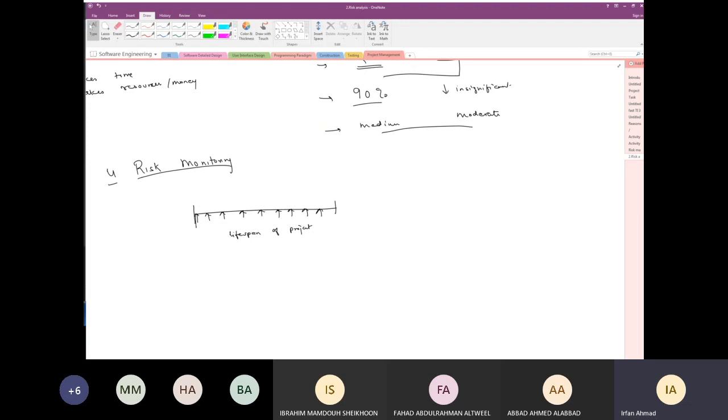Before, you saw that there was a risk that the staff would leave the company. But then after a few weeks, you saw the situation in the market has changed drastically because of some other factors. Now the job market is not that good. So this possibility of many people leaving the company, before it was moderate to high, now it became low.